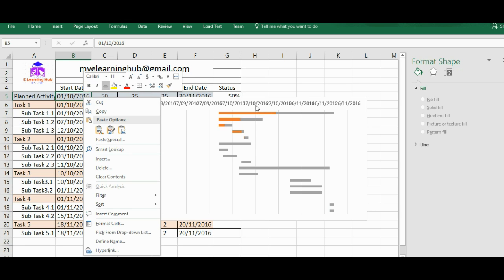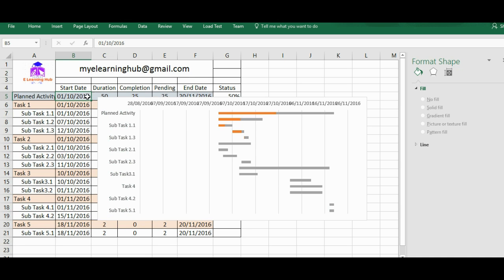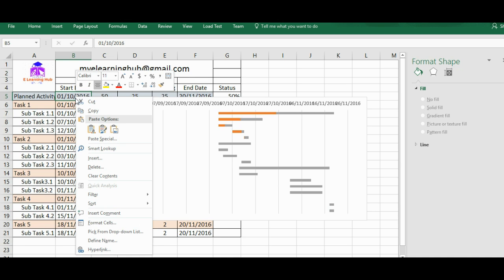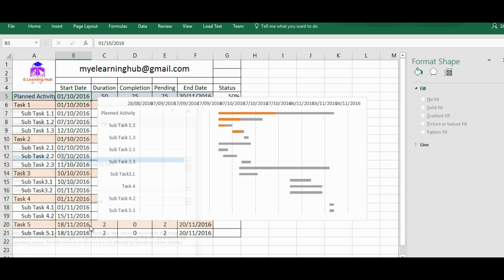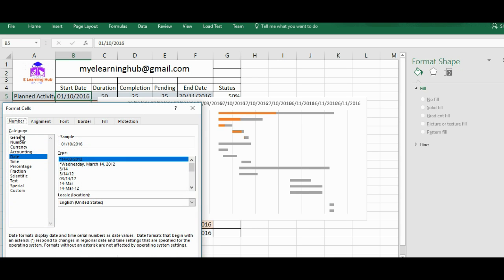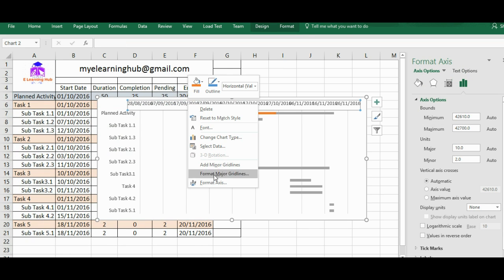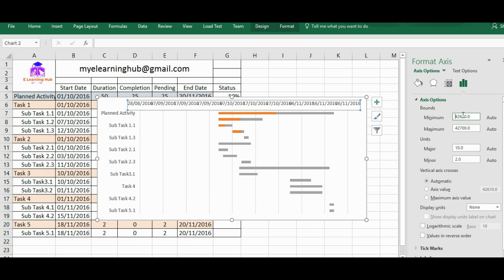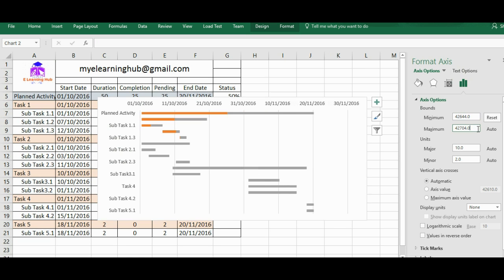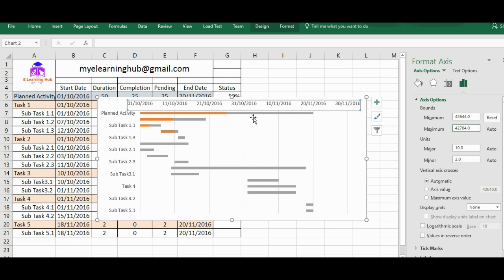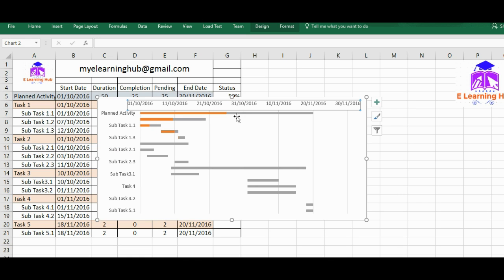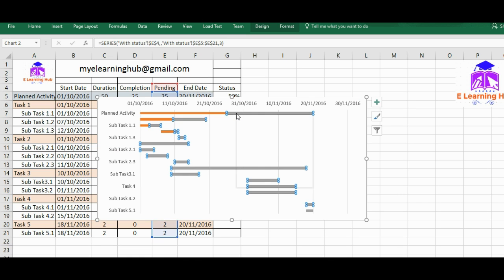Then I need to edit this axis also. In order to edit this Excel axis, just go to the first date and right click and format axis. Find the general number for this, 42644. Just edit this minimum number should be 42644. So that's done.